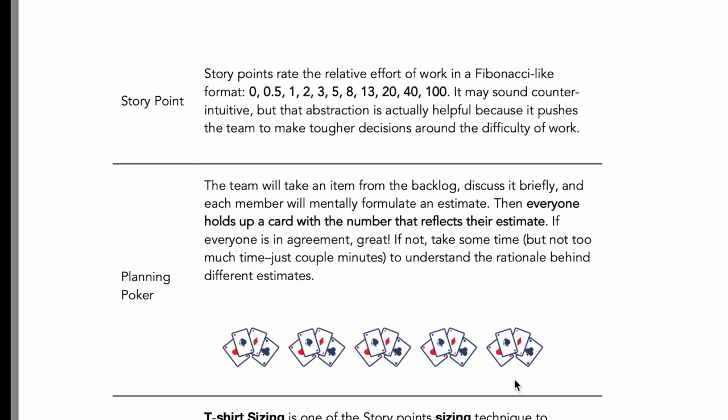We also discussed agile estimation, story point, planning poker and t-shirt sizing. Agile estimation is done in which meeting, you guys know that. The team meets and thinks about what items I can pick up and take for the next iteration. It's easier, because we're talking about 2 weeks or 3 weeks or a maximum of 4 weeks of iteration, rather than talking about how many days things are going to take. You might want to do relative estimation, which is whether the story is big or small and so on.